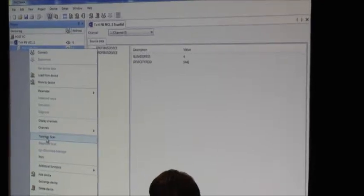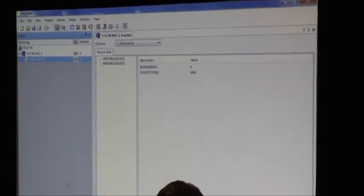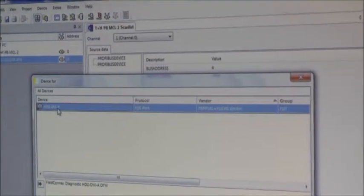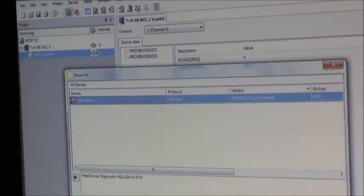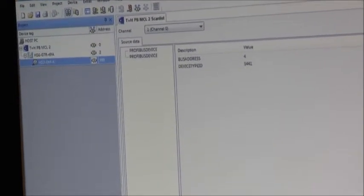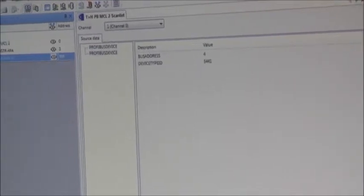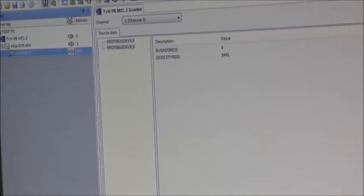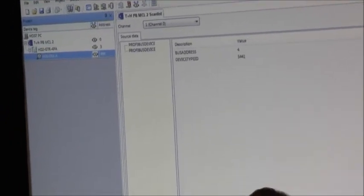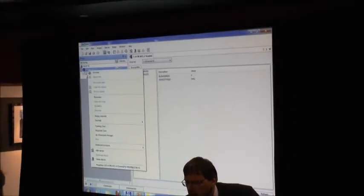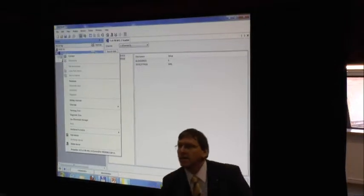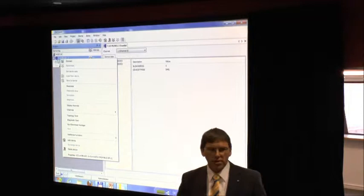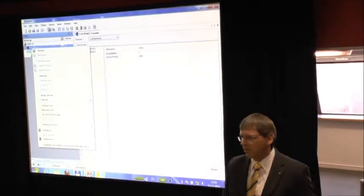And the next step I have to do, to measure and monitor the physical layer, I have to add the DTM from our diagnostic module. It is called the diagnostic module A for advanced. This is what I have to do. I have to add it online. So what I showed you now, step by step, can be done automatically. If you have in your plant a lot of devices, you can initiate a topology scan. But I showed in this case, hand by hand, what you can see in the office.